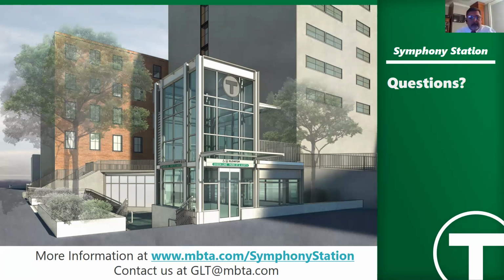Yes. Okay, great. And then Allison has another question. Because Horticultural Hall and Symphony Hall are pending city landmarks, the BLC staff needs to review the head houses, I think. Well, George, what do you think? So we have been in coordination with all the city departments, historical commission. We just received our environmental impact letter, section 106, which talks about the historical impact of the buildings. And we just recently got the go ahead. We're not impacting the historical portion of the buildings whatsoever, and there's no impact that the station will have on the buildings. Okay, all right, thank you.